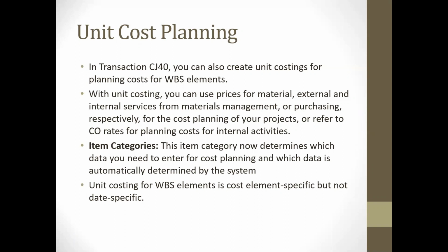With unit costing, you can use multiple prices: prices for material, external services, and internal services from material management, purchasing. For cost planning of your project, you refer to the CO rates, controlling rates, for planned cost for internal activities.